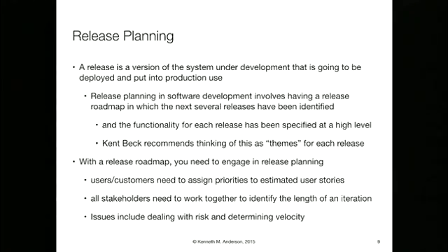But the other aspect of overhead is, so iteration 1 ends. When iteration 2 starts, is that right up? Is it the very next day? Or is it off a cycle? Is it off like a couple days? What do we do as a team or as a company to give ourselves the time to do that planning? Either it eats into your time and you have to account for that, which means, oh yeah, our velocity really should be 30, but we have to spend the first day replanning.